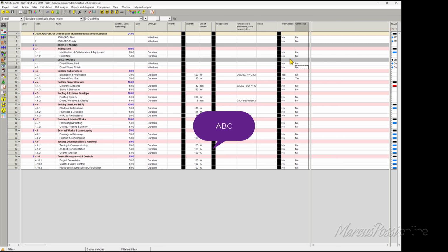But if I do this, all my work will be set, including Saturdays and Sundays. Yes, it will be. But I don't work. No, you don't work does not mean that the activity cannot be done. If you don't work and you are a resource inside your activity, make your resource calendar according to your commercial calendar, because you do not work.